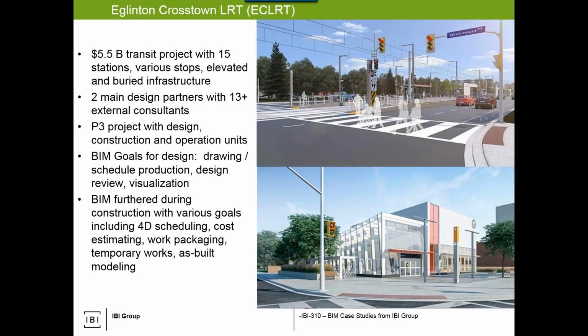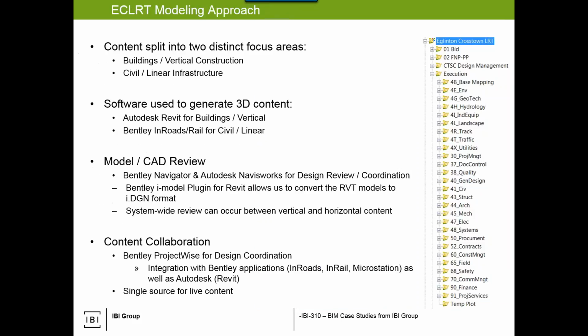And we know, in parallel, and this is the hard part with the P3, in parallel to our design progressing, the contracting entity is taking our models and applying the BIM goals they're trying to achieve, including schedule simulation and cost estimating, which is kind of like your standard contractor, but they're trying to develop work packages as well as design temporary works around progressively changing design models. So it's quite a synergy there.